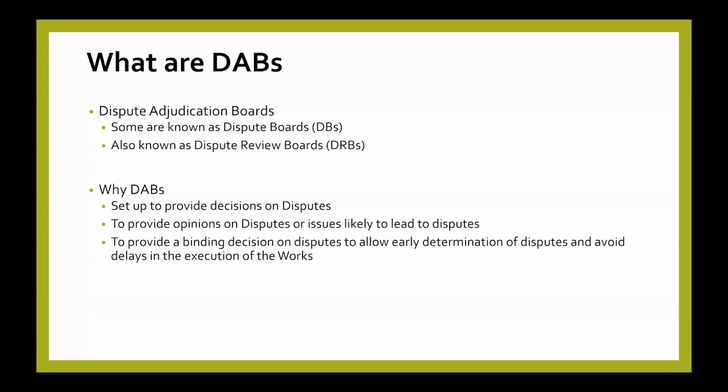So dispute boards, I think they have been around for quite a while. I think they are nearing about 50 years in existence. It started off as a means of bringing in specialists within subject areas to oversee projects. So they were another layer added onto the layer of the engineer or the project manager, so that they would oversee the project, so that if disputes come in, they nip it in the bud, because there's been a lot of experience with disputes affecting projects and their implementation, affecting the execution, and then they drag on, and the cost of it, especially in the courts, and then also in arbitration, becoming very expensive.